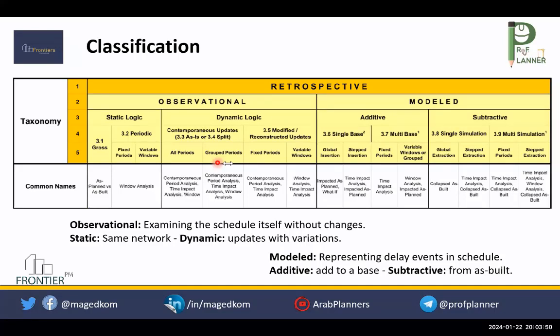Is it clear to you? Yes, we have to reconstruct it. And is the employer's delay critical or not critical? If it is on a path with total float, it is not critical and not affecting the completion date. We will see whether it is affecting and critical. Then we have to reconstruct it that way.